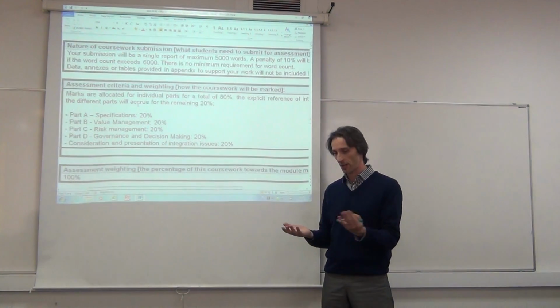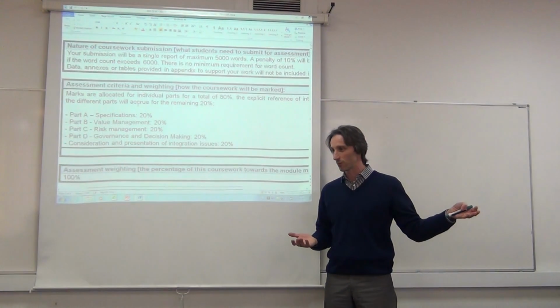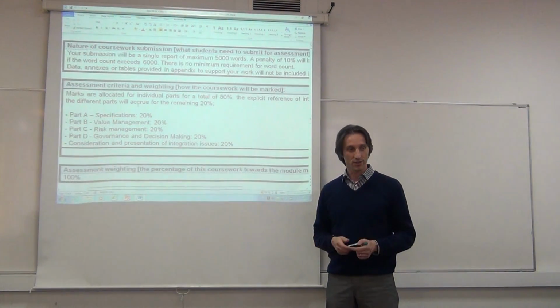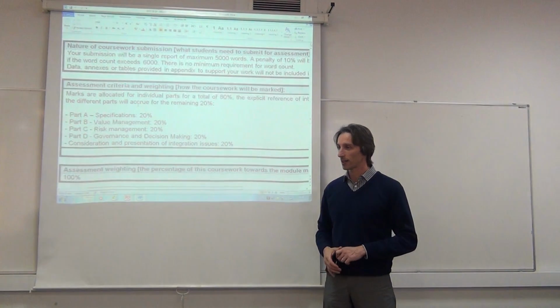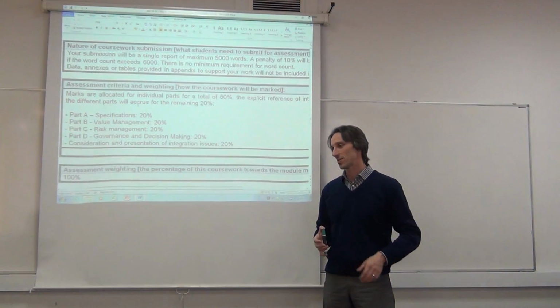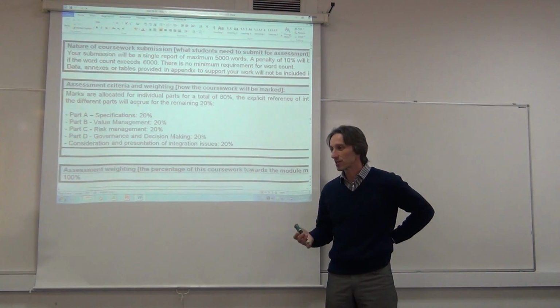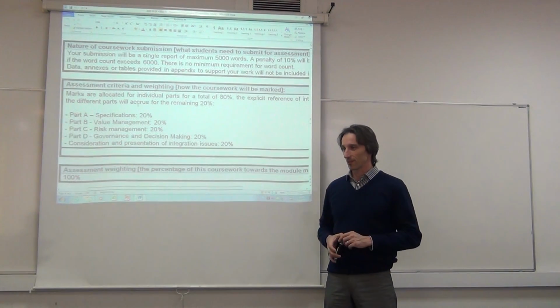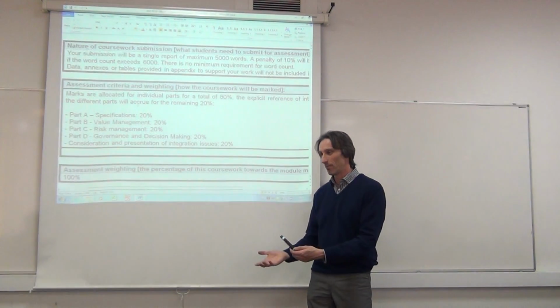And then you go and say, okay, how many nuclear plants are there in the world? 500. Good. So 5% of them were attacked by, or in some way connected with, Greenpeace's efforts. 5%. You now have a number, right?